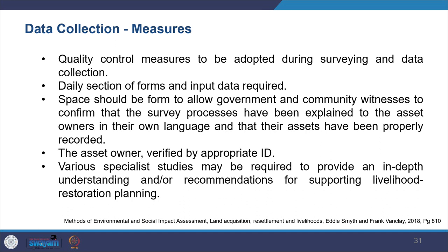And when you're looking at this, you also need to look at how you're taking record of the owner, how you're recording their assets, how you are verifying their IDs. So that all has to be taken care of. And you have to ensure that each form which you're using for documentation is also signed by the owner, and they are able to read it and understand it, signed or thumbprints, whichever way it is required.